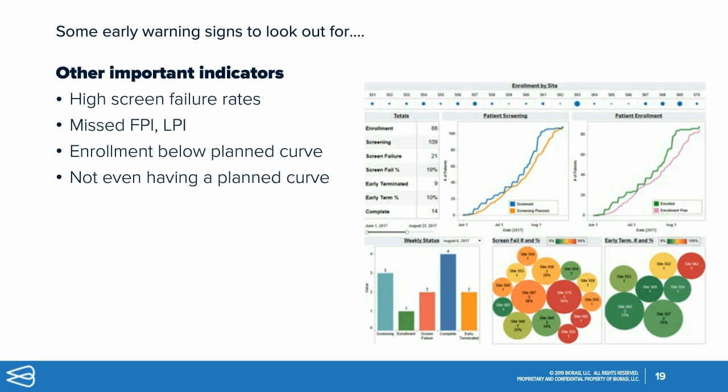And what was happening was that because of the logistical scheduling issues between the patient and the site, a lot of eligible patients were being lost because they were overshooting their screening window, which was 4 weeks. So you had patients that should have met and did meet all inclusion-exclusion criteria, but were not able to enroll into the study because they just couldn't get to all the sites in time.